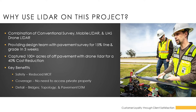We captured those 100-plus acres of off-pavement information mainly with drone-based aerial LiDAR, resulting in a significant reduction — up to 40% — in the overall cost of our survey scope of work.